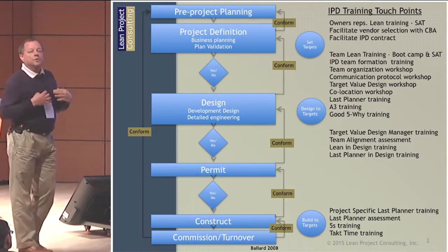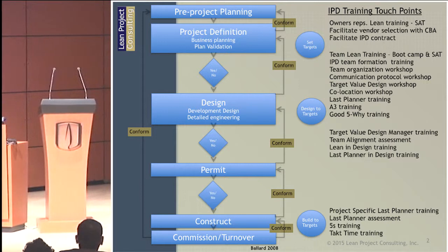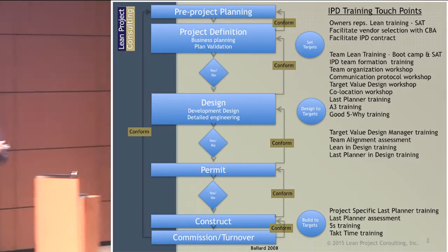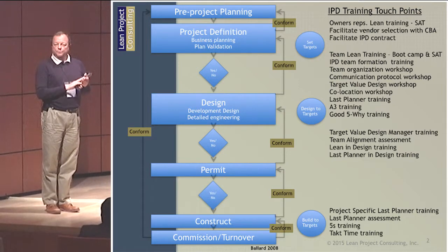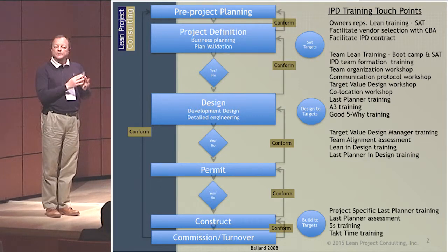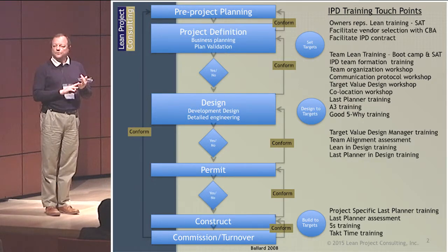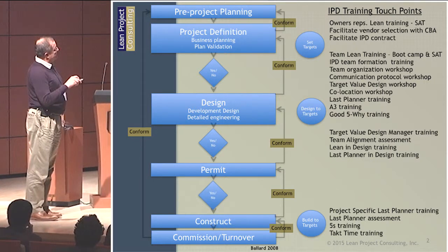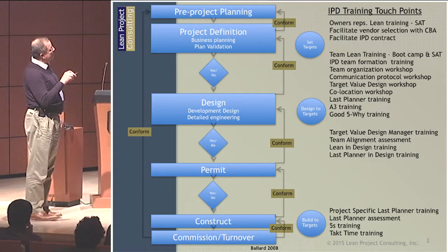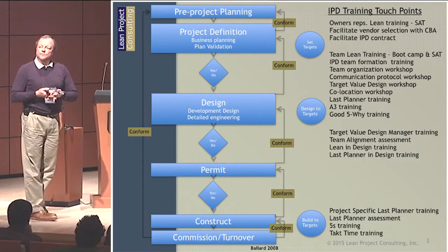In pre-project planning, we would like to see more integration, so that not only are internal organizational people involved — business planners, CEOs, CFOs, board members, and managers — but in that business planning activity, the project is actually originally conceptualized with input from architects, contractors, and sub-trades. Then we move into project definition, where the actual business planners are engaged with the team to examine a project that performs a validation study.